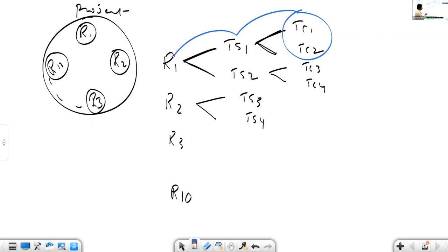What is the advantage of preparing this kind of RTM document? Total number of requirements in the project: 10. Now, as a manager, I would like to know for how many requirements test cases are covered till now. As per the status, only for 1 requirement are test cases covered, out of 10 requirements.